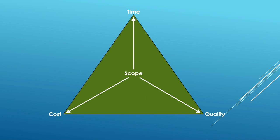A big part of a project manager's job is balancing time, cost and quality to ensure we're doing it as cheaply as possible without taking too long, while also hitting quality targets. Organizations will often say there's not enough money — so if we lose money, we might need to drop quality or take longer because we have fewer resources. Similarly, if time is limited, we might cut corners on quality to go faster, or add budget to bring in additional resources.